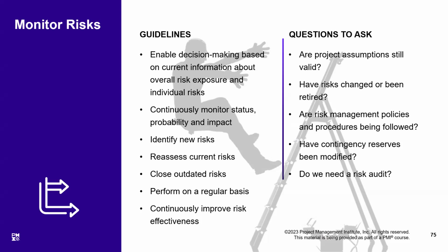Moreover, we also did the quantitative risk analysis for the purpose of finding the riskiest portions of the project life. Is it that time that many of the concurrent risks are likely to occur? So we keep an eye on all the risks and also at the same time, we try to keep identifying any new risks